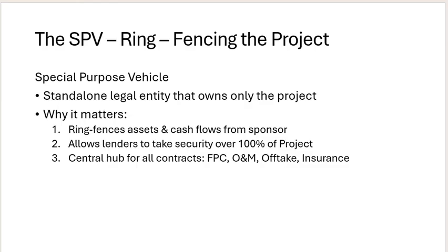It allows the lender to take security over the project, which the sponsor can give. It is also the central hub for all the contracts like EPC, operation and maintenance, the off-taker, and insurance. So that is the central thing, where the off-taker, the EPC contractor, and the insurance all come together.